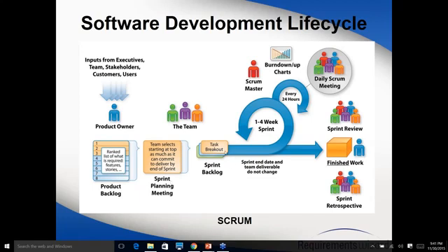Before you actually begin your sprint, that means your design, development, and testing work, you will have a second phase where you do the sprint planning meeting, where the team will pick certain stories. Again, the role of a BA is to explain what those stories are and what the requirements are, and based on that the sprint team will do estimates. The team will say each story will take X amount of time. The reason they do it is because they don't want to take on more work than they can handle.